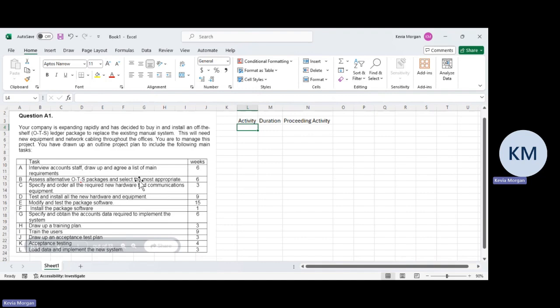If it's something that needs to be bought from an external person, part of that would probably be reaching out to find out how long this will take. Or you can reach out to somebody else who has done the process before, a subject matter expert, and ask them for timelines that make sense. So once you've created these timelines, we have a baseline here of how long we should take for each project. Then they're telling us that they need us to, so after this, we're going to go ahead and create that work breakdown structure.